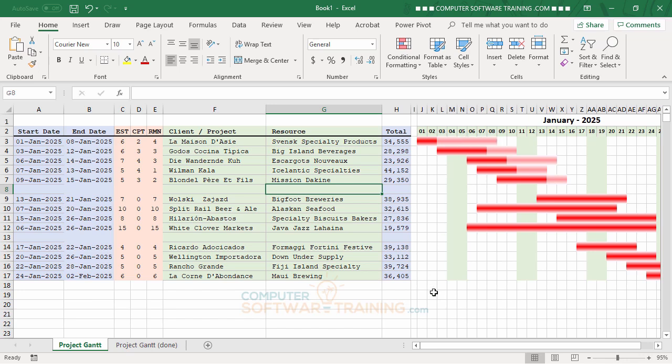That's all. Now, let's say we're tracking the projects here, and we find out that we've got 3 days complete for that first project. So I'll type in 3 here. Now watch what happens. This will extend out. So there's the 3, right? If I decide that that was really going to be only 5 days, I can type in 5, and you'll see that bar shorten up by 1 day.